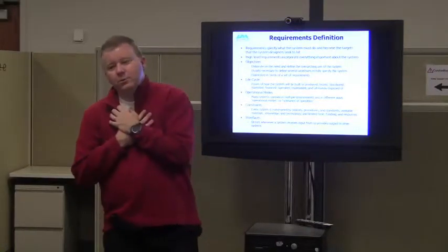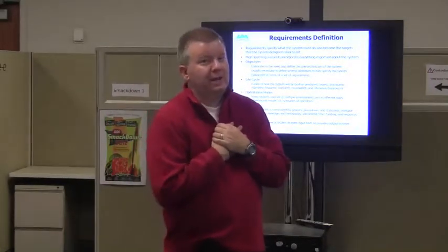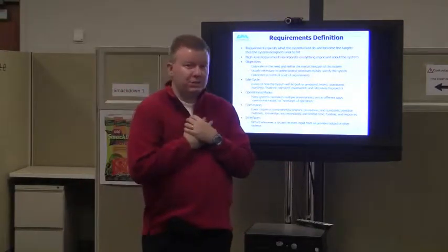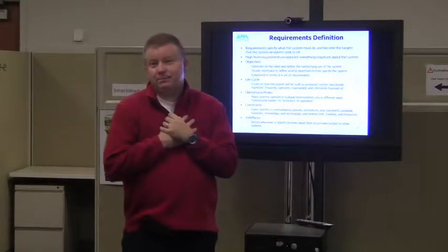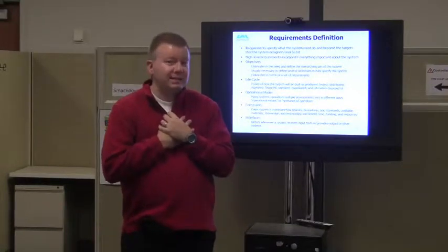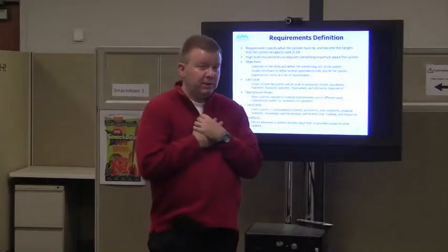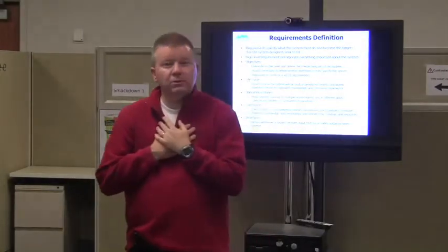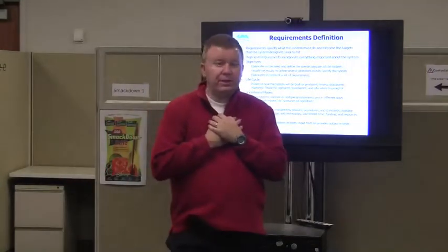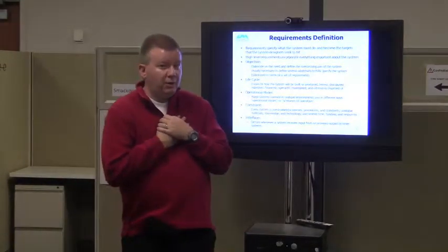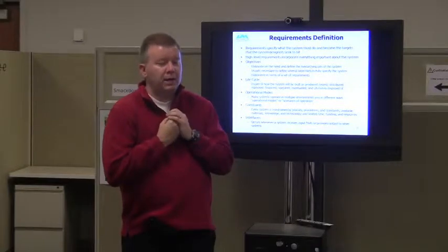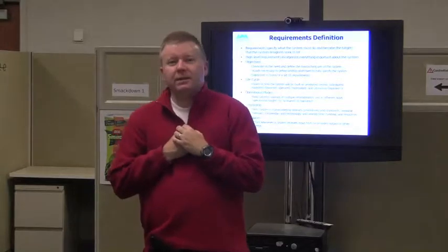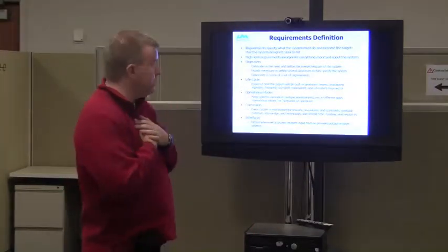I'm an old school requirements person, so I believe that anything that says shall in a requirement specification, it must do. Anything that says must or will do is a nicety, okay? That's what I was taught growing up in requirements development, in requirements definition. And so that's what I want you to do too. You're going to create, in the RFP, a spec, and I want you to make sure to put the shalls as things that must be done in it. I'm the old school guy.